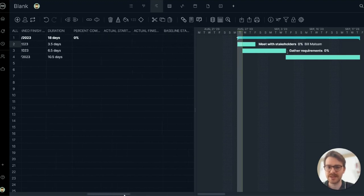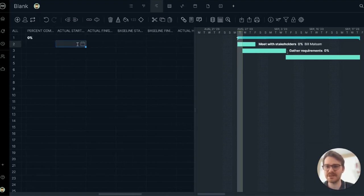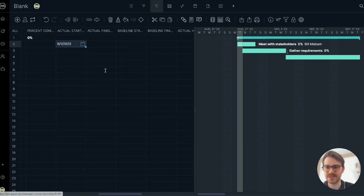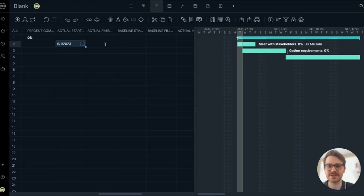Let's keep going. So now I'm in the actual columns. Let's say the task is being executed. It actually started a little bit later than we thought. It started in September. So I'm going to update that there. And now I can compare the actual versus planned dates to keep my project on track.